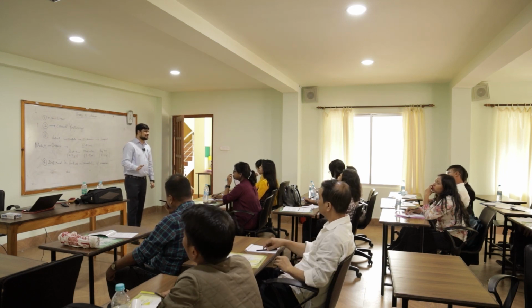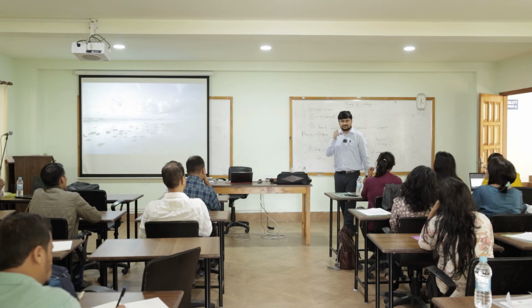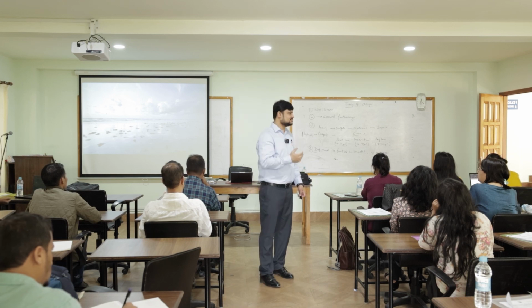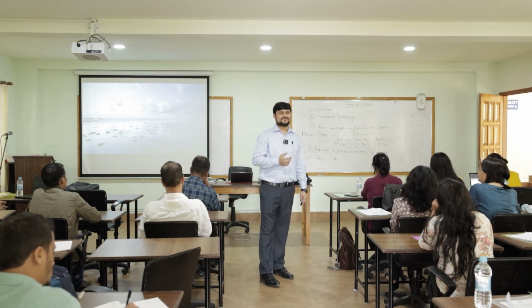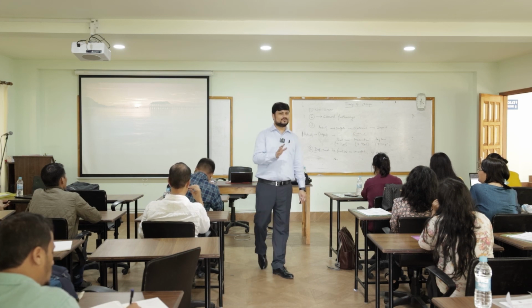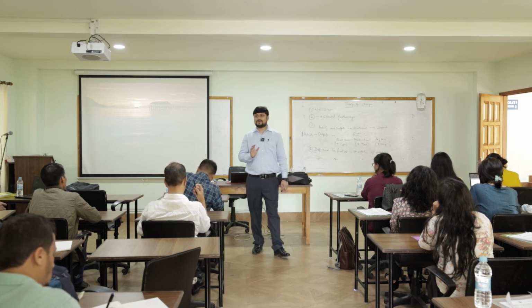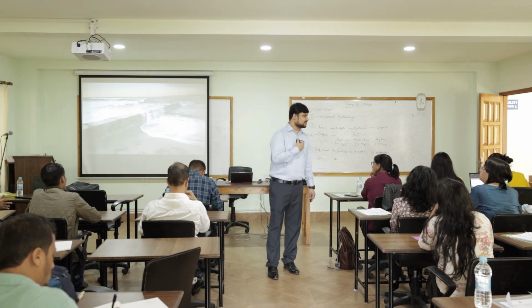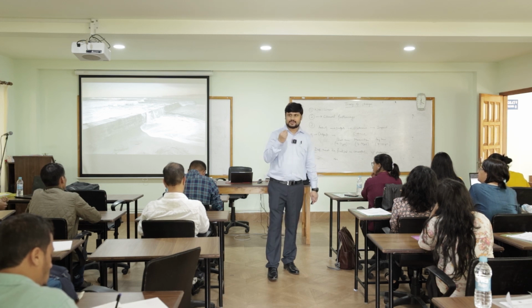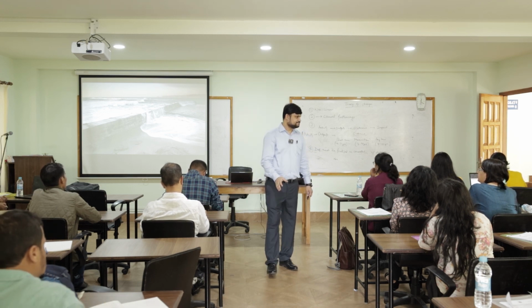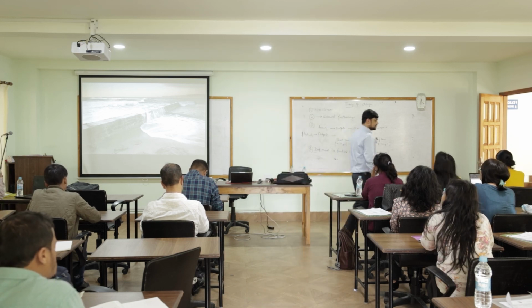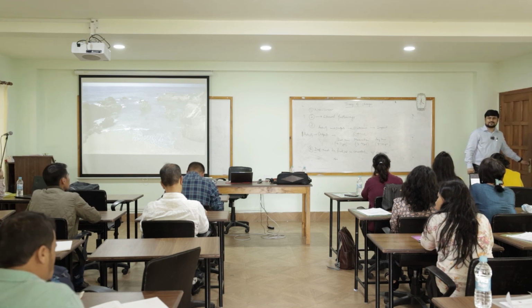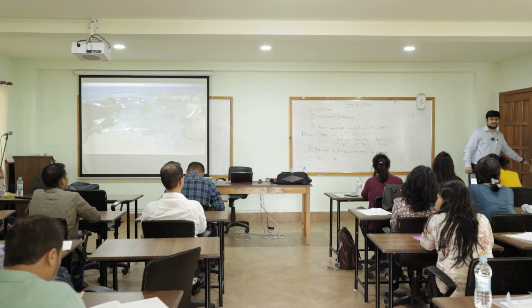It is not a one-sitting job. Usually we take anywhere between 3 to 5 sittings if we have some resources. If we have a lot of resources, obviously we can sit for 10 meetings, right? But usually anywhere between 2 to 5 meetings is what is required to prepare a theory of change. Otherwise, it doesn't make any sense. From an evaluator's point of view, if I come up with something, it might completely be irrelevant for the implementation team, right? And at the end of the day, we are here to serve the objectives of the implementation and not of the evaluation. The evaluation is for a particular implementation, not vice versa.